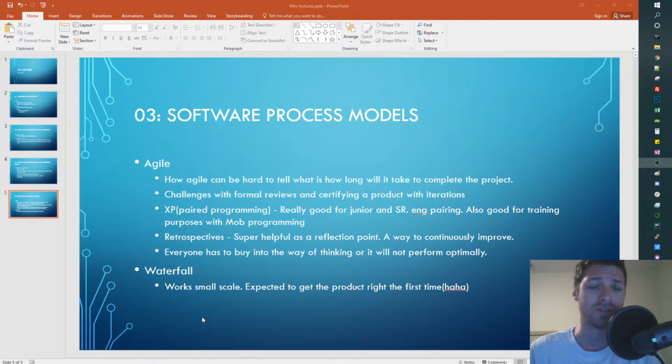I think in some legacy projects in my company, they've created some kind of estimation of how many lines of code there will be, and then the cost of what each line of code will be from end to end. I think that was not granular enough, so they came up with this new approach, which I think is a pretty good idea. But from a different Agile standpoint, you could just do everything based off of tasks. And over time, you can weight them on how big they are and how small they are. And as long as you have defined all your tasks, or really stories and epics, up front and laid them out, you can guesstimate when things will get done and how long they'll take to get done.